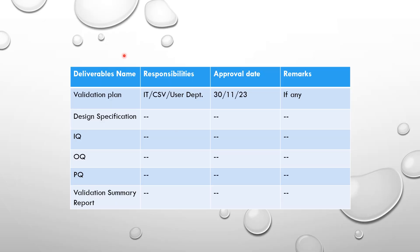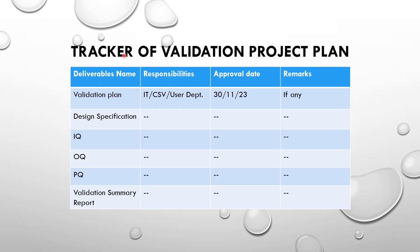Now we will discuss about how the validation project plan tracker is prepared. In the first column, we need to mention the deliverables name which are required as per the different GXP categories — for example, validation plan, design specification, IQ, OQ, PQ, and validation summary report.